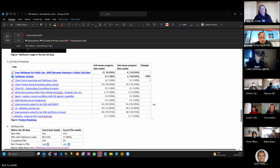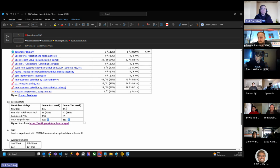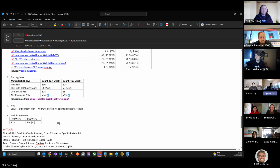Okay. Let's move on. Backlog stats. In the past 30 days, we have 114 PBIs created, 77 or 68% of them created by YakShaver. We have completed 59 PBIs, so the net change is plus 55. So those numbers are more realistic, right? We got rid of the duplicates and whatever else we were finding before. Yes, correct. Okay. Awesome.